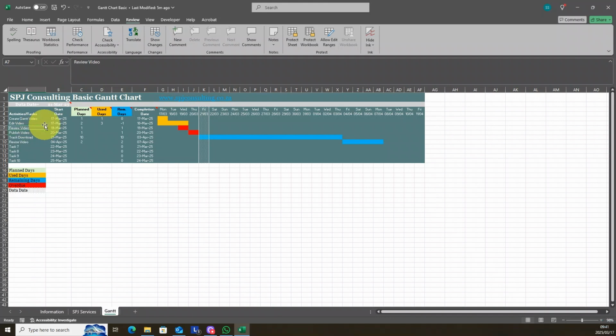Let's fix that video. I'm not too great, so I must decide, okay, am I going to adjust that to start later or earlier, because you can see that's overdue, or I can just leave it and try to make up the time. So I've decided to make up the time, and I did. So as you can see in this example, the published video is actually 1 day overdue according to the data date.